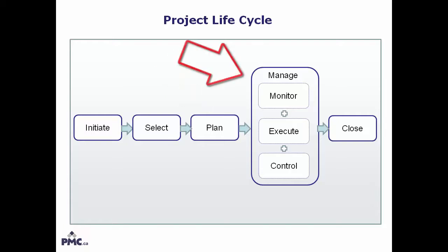In the manage phase, if we do not achieve the progress that we had planned and scheduled, we could eventually face an overallocation situation, especially if we need to keep to our delivery dates. That is, trying to squeeze out more time from your team members in smaller and smaller time frames, which will definitely cause an overallocation situation, and/or our assigned team members begin to overlap on commitments made on other projects.